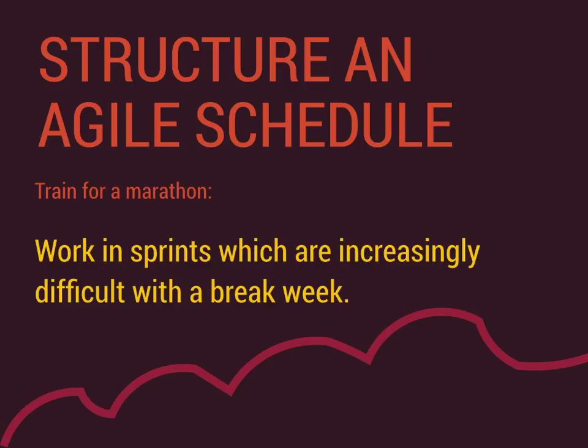Now, I didn't taper it quite as much, but there's also this concept in sports training where you have a taper at the end. So the taper at the end, in terms of the agile or client delivery process, is going to be perhaps your final QA period, if you do that as a separate final push. This buys you a little bit of time at the end for unexpected things, but really, not ending on hard stuff, ending on really easy stuff, so that you've got that extra time in place.